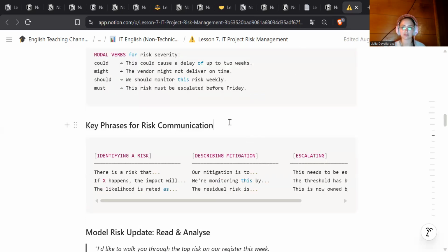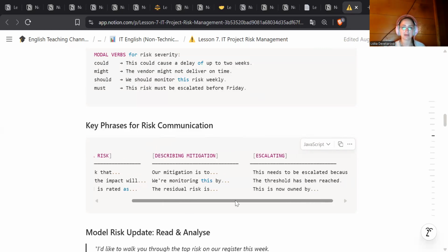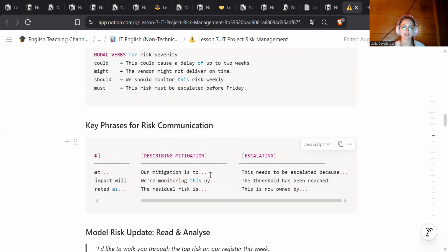Key phrases for risk communication. Identifying a risk. There is a risk that if something happens, the impact will... The likelihood is rated as... Describing mitigation. Our mitigation is... We are monitoring this by... The residual risk is... Escalating. This needs to be escalated because the threshold has been reached. This is now owned by...